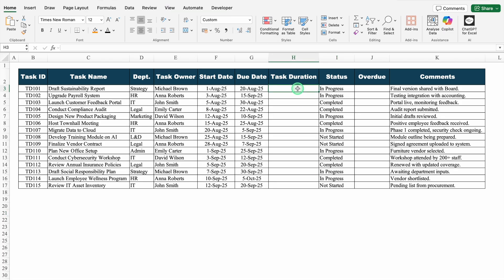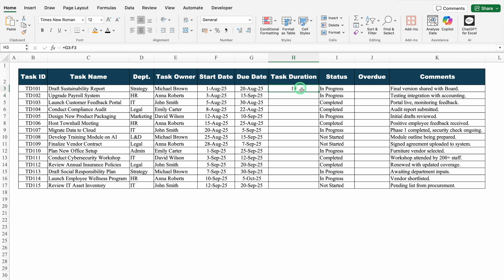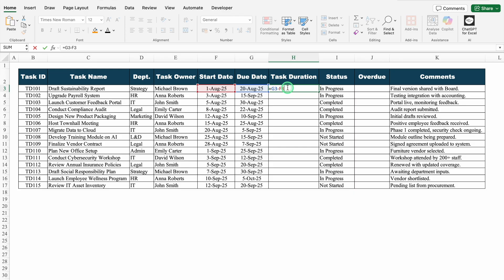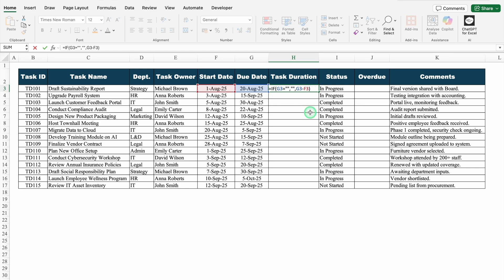Let's come to task duration. I will insert the formula here. The formula will be equal to due date minus start date, and I will hit enter. We got total duration as 19. What will happen if I delete the due date? We got some random figure. I will undo this. We will double click on the formula, come to the very beginning, and insert the criteria of IF. If the due date is equal to blank — I will insert double inverted commas twice — comma. If due date will be blank, in return I want blank, so double inverted commas twice again, comma. If this criteria will not be met, I want due date minus start date. I will close the bracket and hit enter.